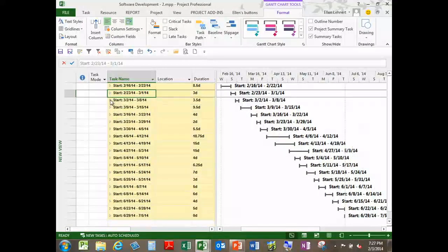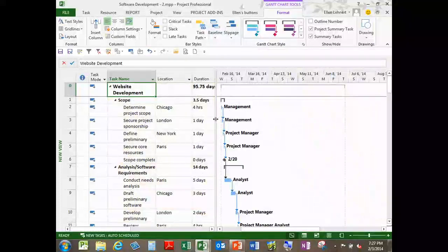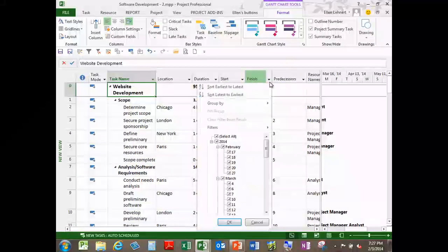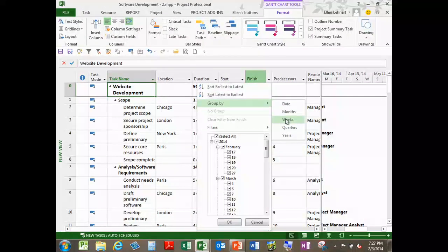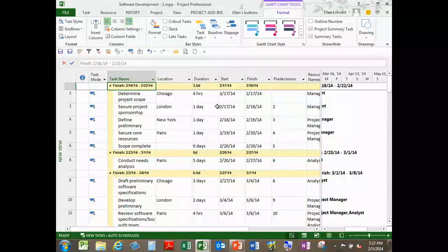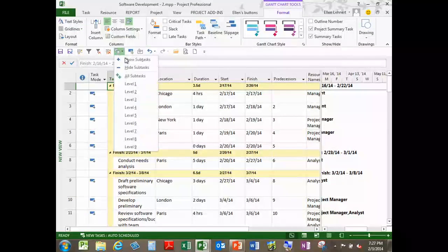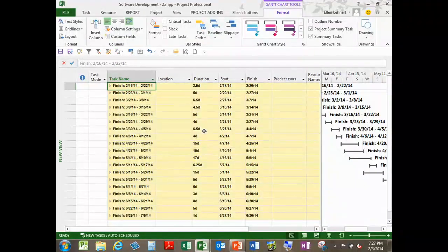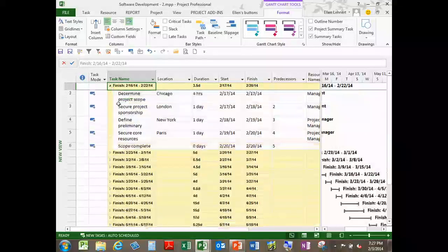And on and on. And I like to do this in 2 different ways. One of them is to look at the start like this. Now, here's where this clear group comes in. See how easy that was? And then I like to do it again based on finish weeks. So now what is scheduled to finish next week? And again, I get this nice waterfall over here, and I can see how much work I need to be watching.